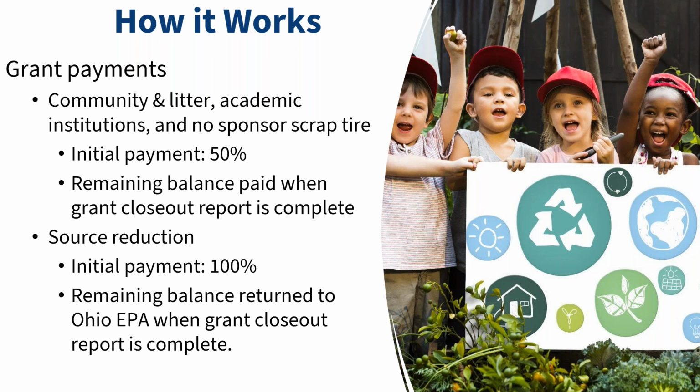If you received funding for a resource reduction grant, also referred to as the water bottle refilling station grant, for the purchase of water bottle refilling station equipment, you will receive an initial payment of 100% of the award and are required to complete the online closeout reporting information to successfully close your project.